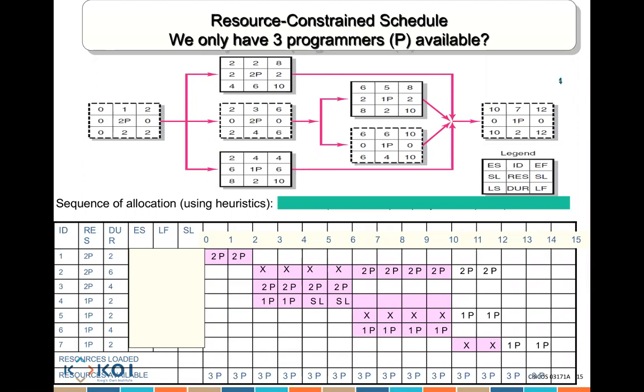Also, I just noticed that basically the network diagram is just an ultimate guide for the Gantt chart, because it looks like from the Gantt chart it ends at day 14, whereas on the network it just says it ends at day 12. So correct. When there's a resource constraint, it means when you are using your slack, your project duration is increasing.